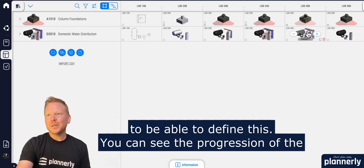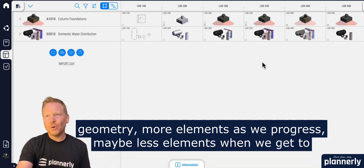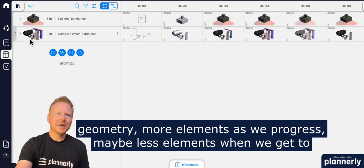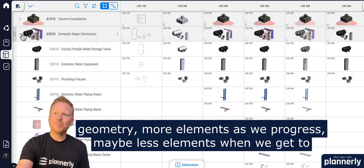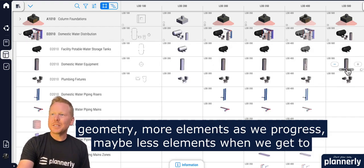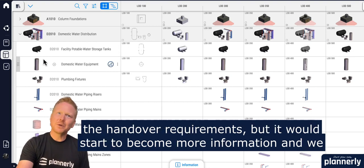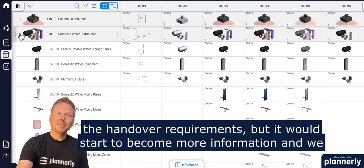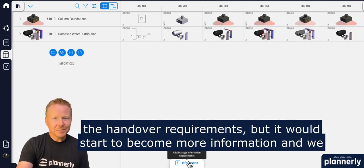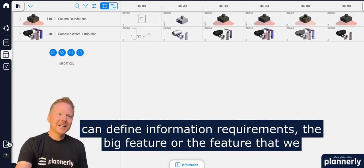You can see the progression of the geometry — more elements as we progress, maybe fewer elements when we get to the handover requirements, but it starts to become more information-focused and we can define information requirements.